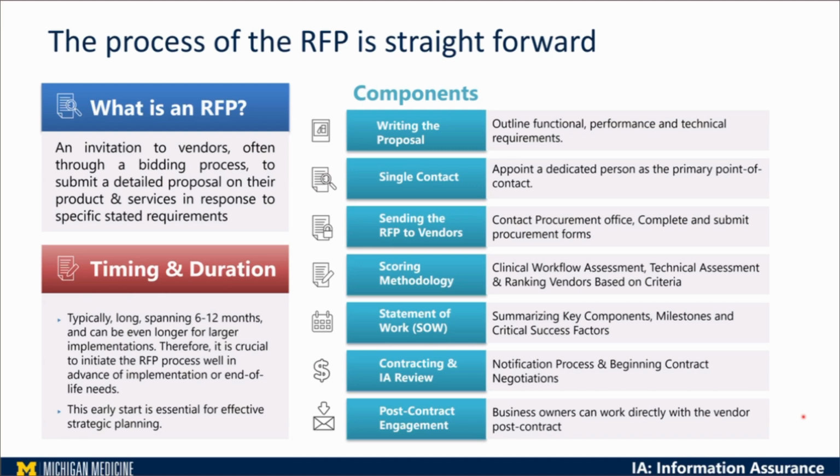You have to make sure that when you communicate with the department, you are clear that once the RFP has started, only the procurement team contacts the vendors. After they sign the contract, everything is fine.